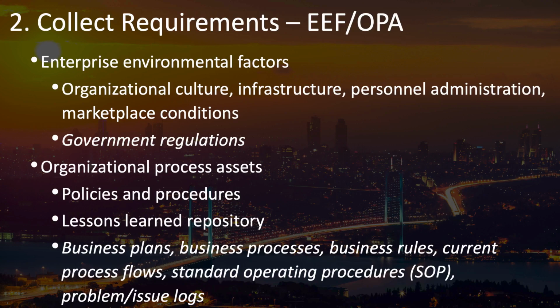However, these are mentioned as inputs in the tools and techniques section of the collect requirements process. So I have pulled them into here since this is really where they should be, as valid and useful inputs to this process. So this first one that I've brought in is government regulations, which of course can affect your requirements and may dictate several requirements for you. Your organizational process assets, as always, include policies and procedures that may affect how you should be collecting requirements, as well as your lessons learned repository, which may contain some useful information about effective techniques for collecting requirements that have proved useful on previous projects.